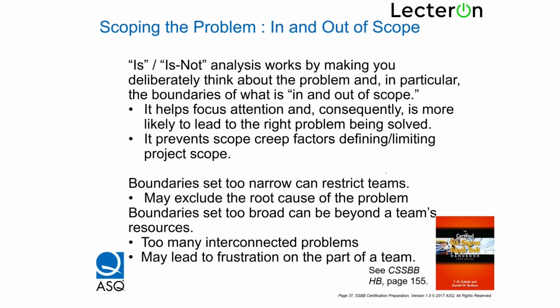So what you do in the project scope is you are scoping the problem: what is in and what is out. Is and is not analysis works by making you deliberately think about the problem and in particular the boundaries of what is in and out of scope. It helps focus attention and consequently is more likely to lead to the right problem being solved. It prevents scope creep.